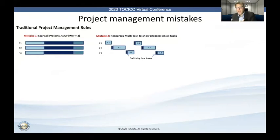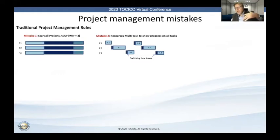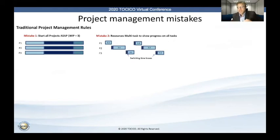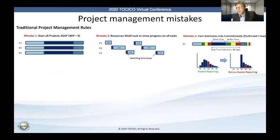The second mistake is they allowed — or almost forced — their resources to multitask. Because as soon as you start projects one, two, and three, those customers expect you to report progress, and that will generate a demand to constantly switch tasks, both task switching and project switching in order to show progress. That will add to further delays. And then the last one is a very interesting question: if we're starting to notice that things are going to take longer, will it help to start holding people accountable, to turn their estimates into commitments? Will that help or harm?